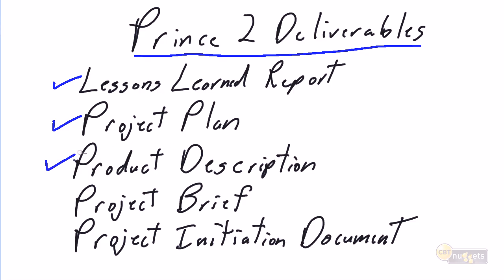We're also going to review a bit of a working document. It's the product description. There will be one of these documents for each of the products, for each of the deliverables that the project is going to deliver. Not our Prince2 deliverables, but the project deliverables. So the analysis document, the design document, we will produce in advance, upfront during planning, and a description of what the product is, what the deliverable is, and what the expectations of content for that product are going to be.